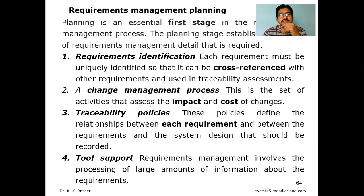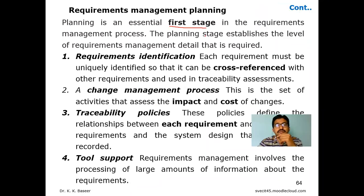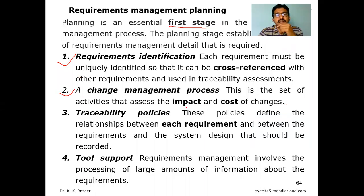Planning is the first stage in the requirements management process. Without planning it is very difficult to control changes. In this planning phase, you need to: first, identify the requirements; second, ensure a change management process that assesses the impact and cost of changes — it will tell you the impact on project development and cost if any activities or changes are made; third, establish a traceability policy.